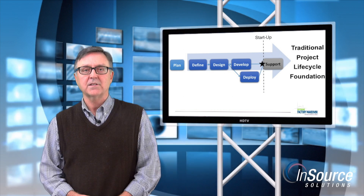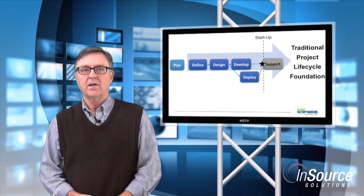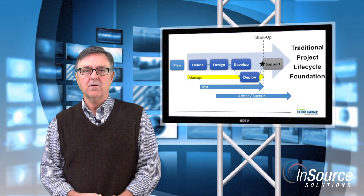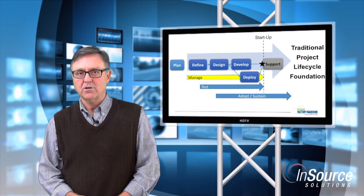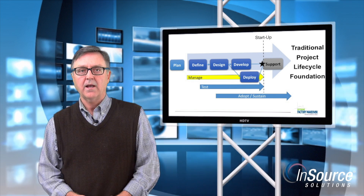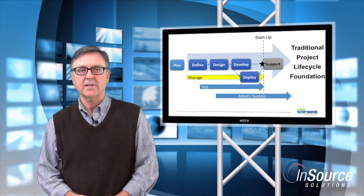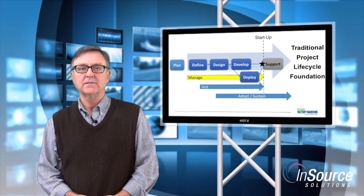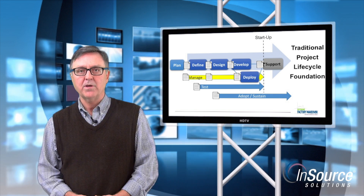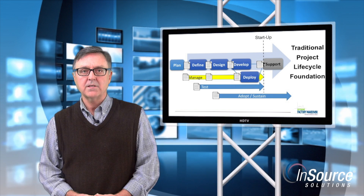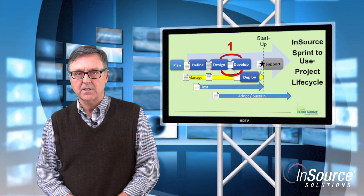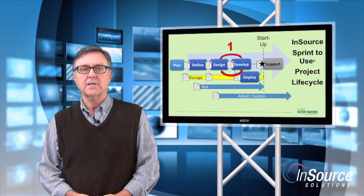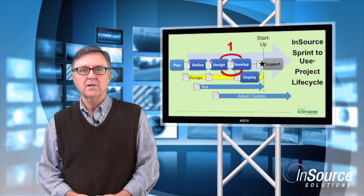There are five phases in our project methodology: define, design, develop, deploy, and support. Additionally, there are three project management processes that cut across all phases: manage, test, and adopt/sustain. On the surface, this looks like classic waterfall project methodology and it does reflect some best practices from traditional project management. For example, the project is broken into phases with clearly defined activities and a primary deliverable for each phase. The approval of the deliverable is the gate to signal phase completion and readiness to proceed to the next phase. Progress is easily measured and reported. But there are some distinct differences in our approach — we have incorporated the latest concepts in agile project execution and post-deployment sustainability.